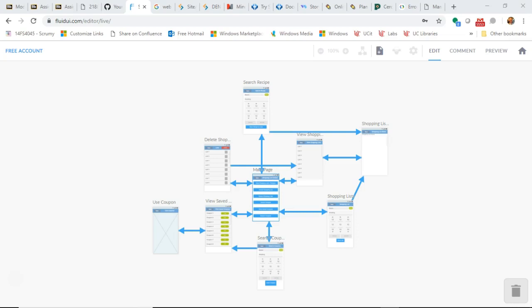And that's a big focus of this design document, is I want to make sure that we can operate in parallel, not in serial. Reason being, let's say that the person who signed up to do persistence and business logic has a busy semester and isn't making his or her commitments. If we're in serial, then everybody else has to wait on that person. If we're in parallel, we can continue to work separately while we're waiting for this other person. So that's what I'm looking for in the design document.